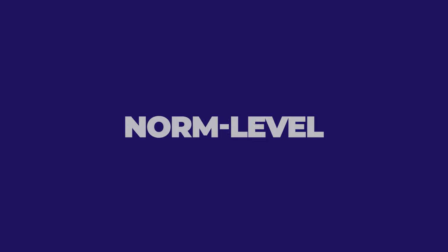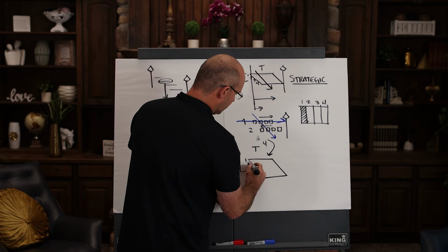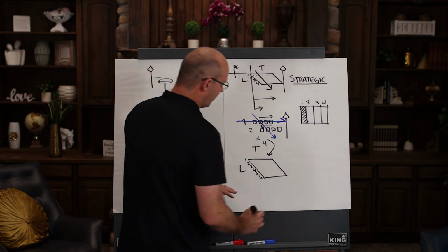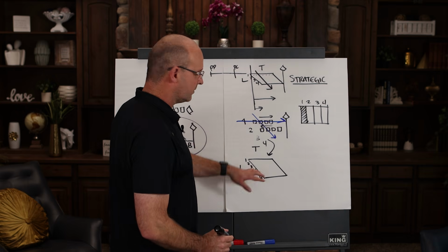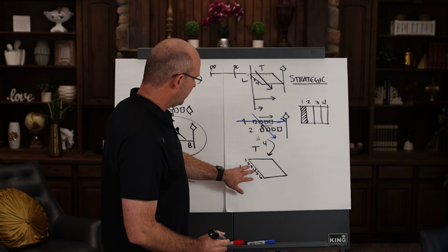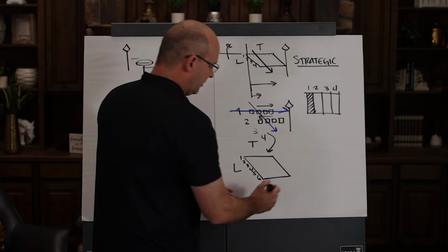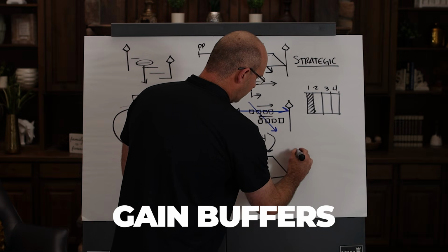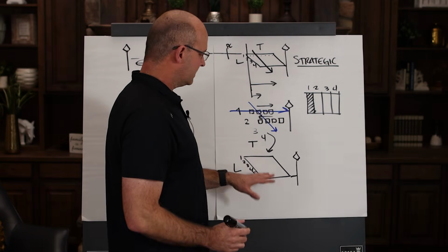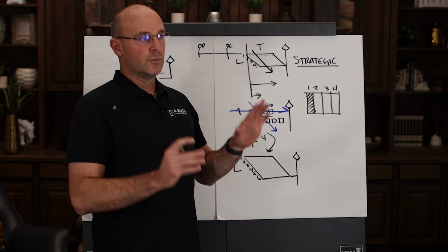And what I mean by that is, in a time by location, with the number of zones that you've optimized to. Let's say that you have more zones. You typically will have more zones here than you did originally here. And you will have gained buffers because you optimized in the pull plan. This is now your norm level production plan.